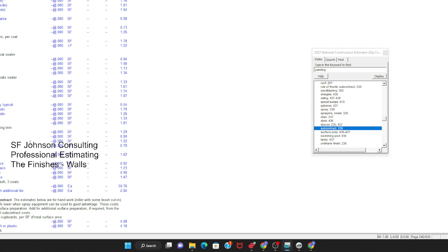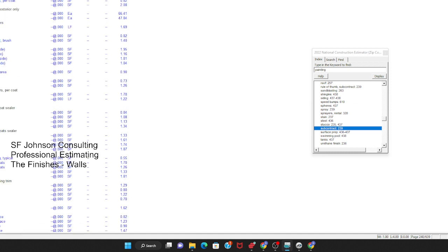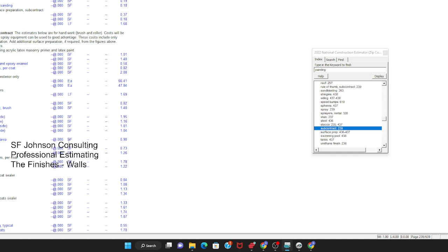So siding, roofs, porches, metal, lattice work. Of course, that's going to be more, not too far off because that's intricate, and that's the cost per square foot. Handrails, linear foot, $1.22. So this is paint and labor subcontract per linear foot, per square foot.